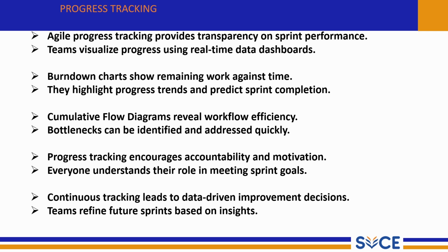With a cumulative flow diagram, teams can easily identify the bottlenecks, areas where the work is getting stuck. For example, if many tasks are waiting in the testing stage, it means testing is overloaded and needs attention.